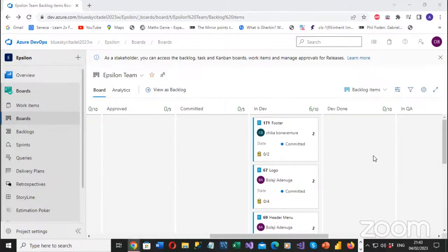And you have to be smart as well. Because if you're in a team where everybody's new, people have come with different ideas, different experience, and some people don't have the experience at all. So you, as that person that understands what you want to do in your first sprint to write your automation test framework, need to put your story on the board as well, because you are going to have to estimate your story. It's a 5-pointer for me.